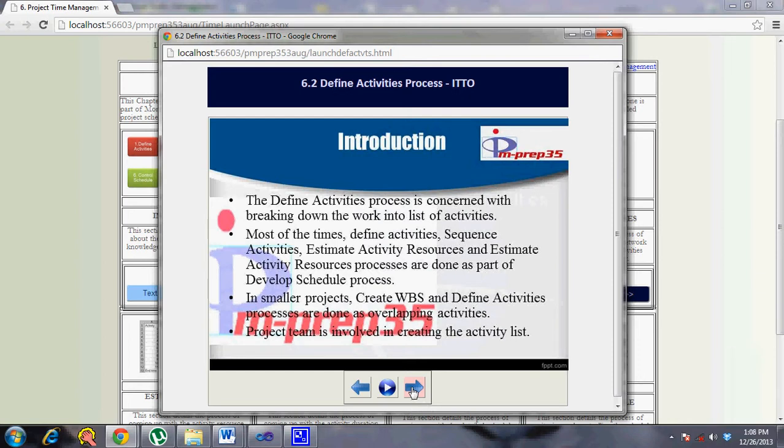The activity is useful to see progress on a day-to-day basis. It's something where a team member says, I need to do these activities on so and so date, so he's more comfortable with it, and you can track that on a daily basis. He tells you a planned date, and then on a day-to-day basis you can talk to him and get the actuals and fill the activity list, or when you put it in the schedule, against that activity list. For each activity you can enter your actuals, because while putting down the schedule you have the planned dates already put in there in the schedule.